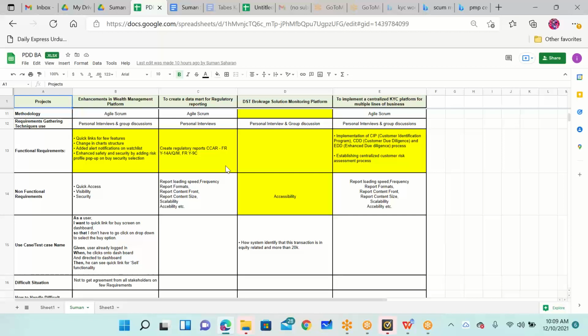Kshitija, can you tell me what was the team size if you worked in Agile in your projects? Do you remember? No, I was not into Agile. But yesterday I gave the answer of 8. As per my husband, if there are 2 BAs, then there should be 4 developers and 2 QAs. Yes, for 2 developers there should be 1 QA. So 1 Scrum Master, total 9 people. Yeah, so stick with that. 2 BAs, 4 developers, 2 QAs, 1 Scrum Master, and if it's a project related to data, then a data architect as well. And the product owner? That is not part of your sprint team. That is part of the Scrum team, but not the sprint team.